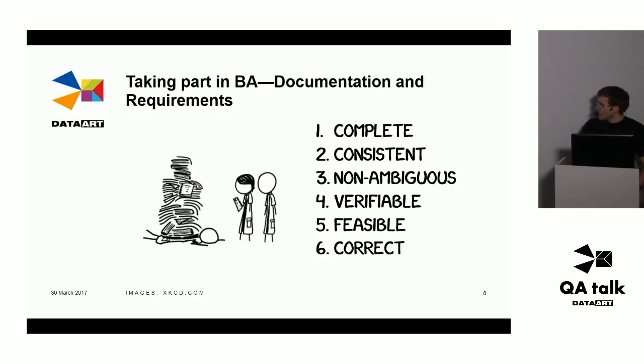Also, it's not in this list, but non-functional requirements are often underestimated. Finally, it's going to be you who picks the browser, screen resolution, operating system, etc. And let's say one extra browser in non-functional requirements may sometimes double QA efforts. So don't forget to think about it. Again, ask your questions, apply your critical thinking.